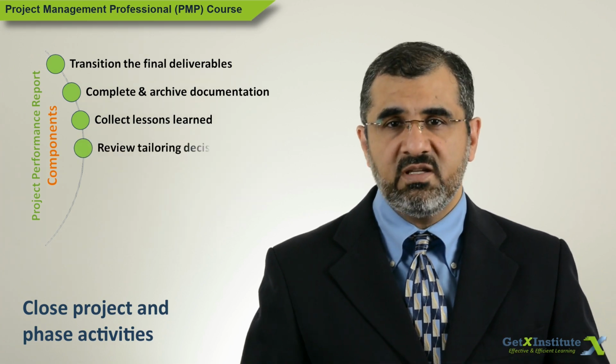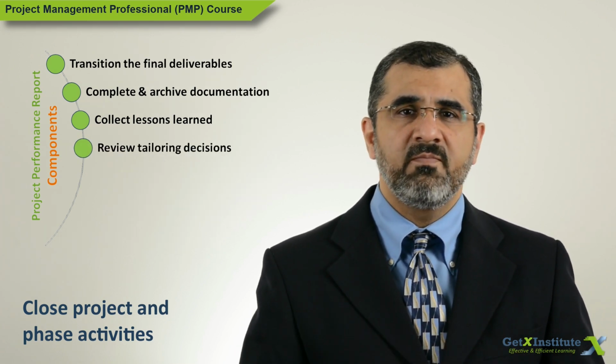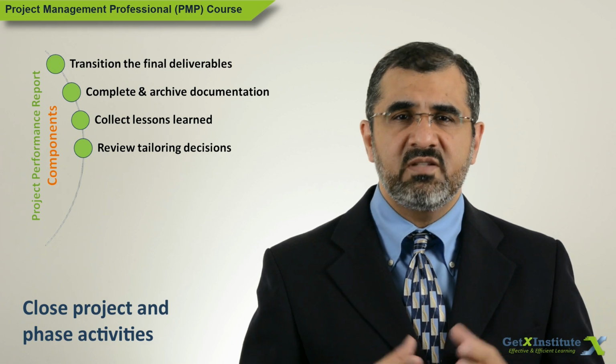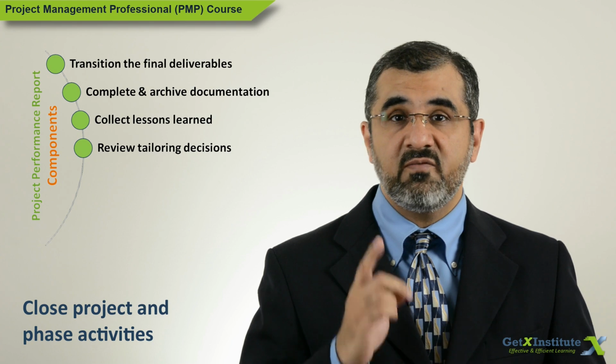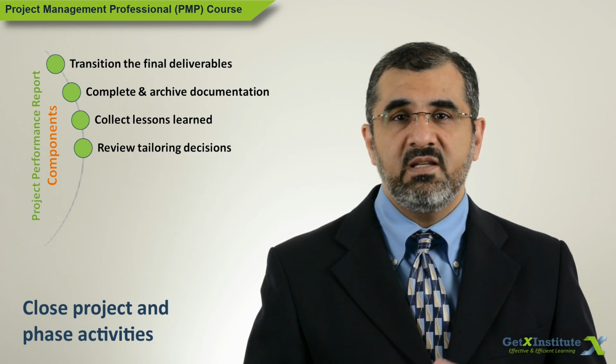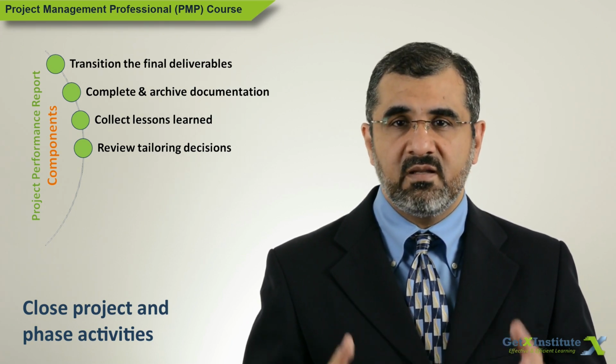Review tailoring decisions. During initiation, the project team may have tailored out certain processes. This is the time to check if the tailoring decisions were the right decisions. This review is done for lessons learned purposes.